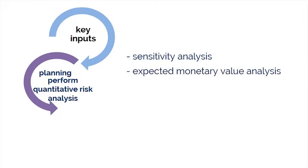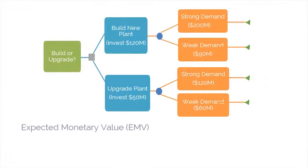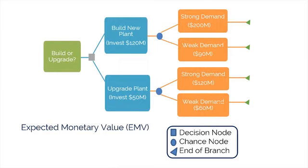Second, Expected Monetary Value, or EMV, is a statistical concept that calculates the average outcome when the future includes scenarios that may or may not happen — that is, analysis under uncertainty. A common use of this type of analysis is a decision tree analysis, which you can see here. EMV is a ballpark figure; think of it as an average of the best and worst case scenarios. It accounts not only for the dollar figure assigned to each outcome, but also for the likelihood of that outcome occurring. To calculate EMV, multiply the dollar value of each possible outcome by each outcome's chance of occurring, or percentage, and total the results.